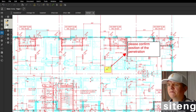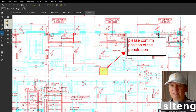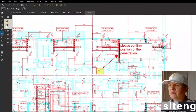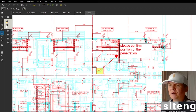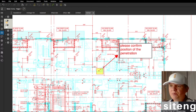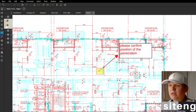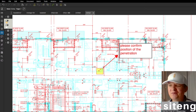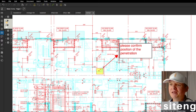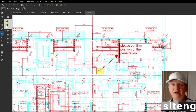Once you open this you clearly see 'please confirm position of the penetration' and you can see something is wrong. Some people won't even speak with you until you raise the official RFI, but typically I try to send emails and get the answer informally first. Remember that the response time for an RFI is typically seven or even 14 days depending on the job.